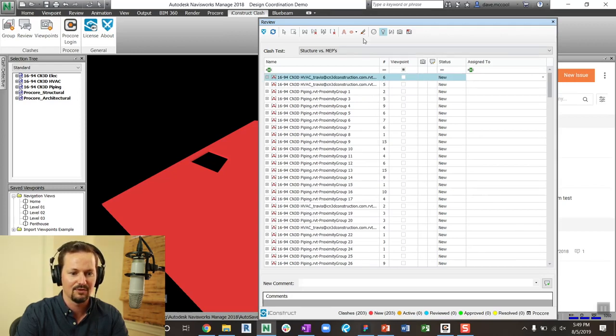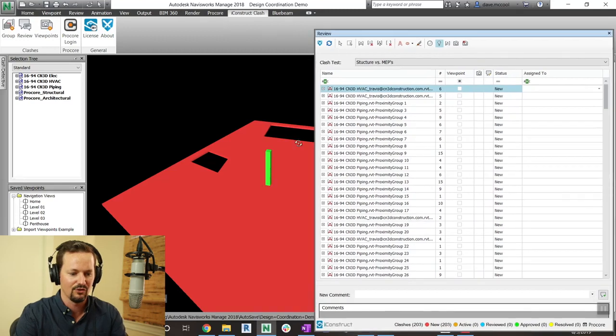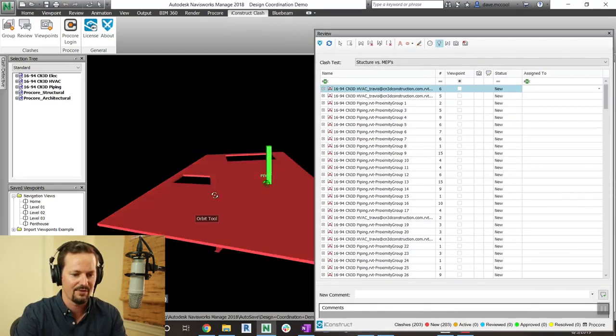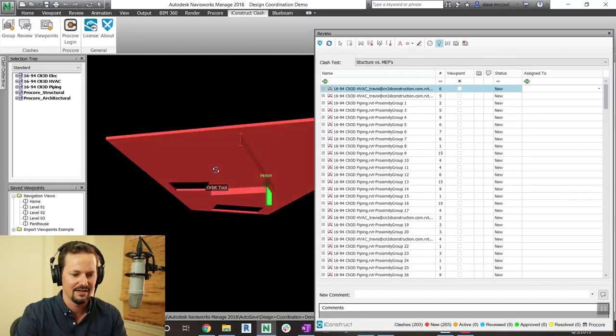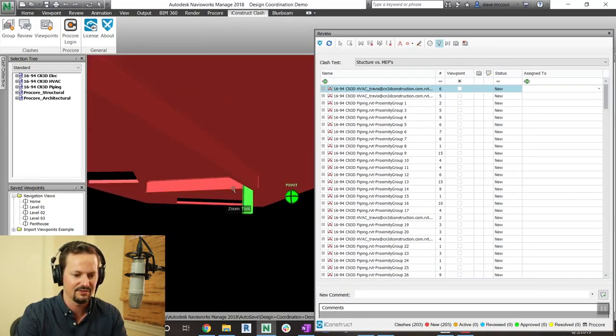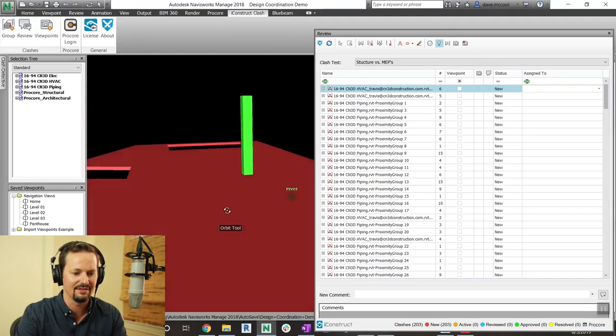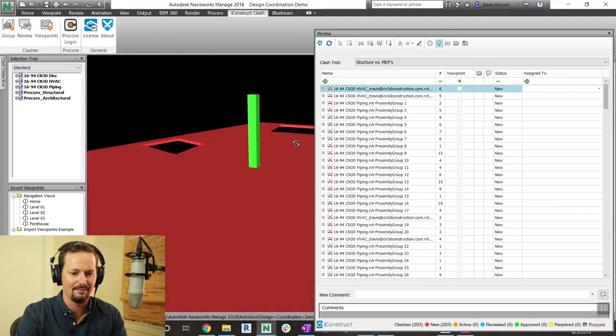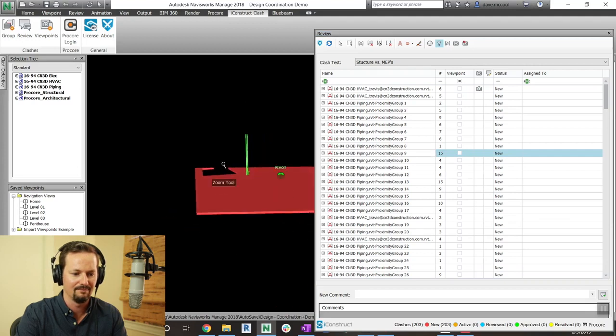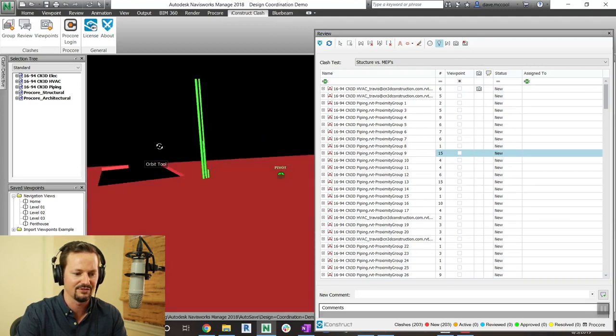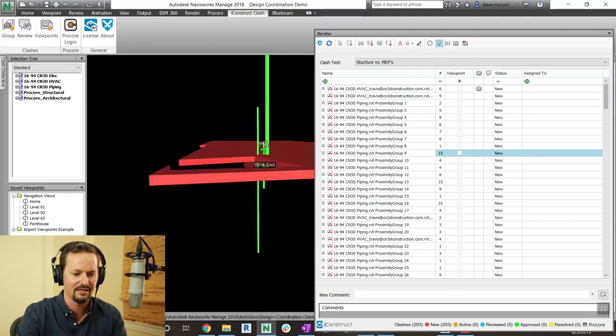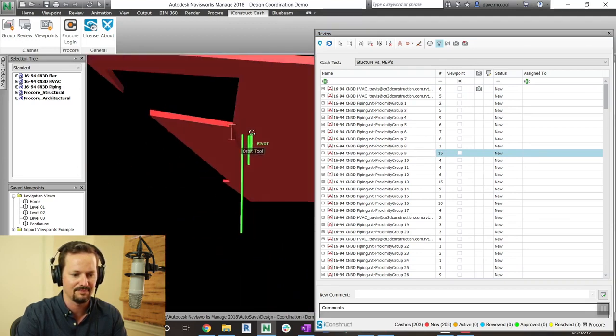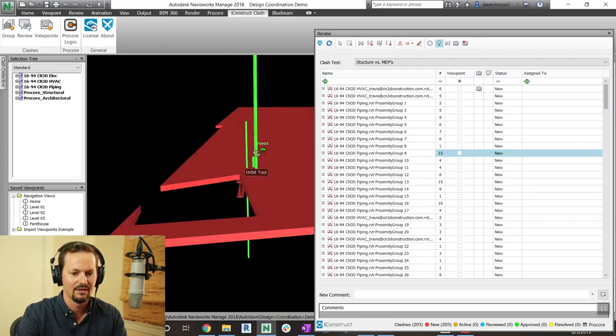So I have six clashes in this group. If we take a look, we can rotate around and you can see it actually has, this looks like a riser with the beam and the slab as the conflict. But you can also see like this one with piping has 15. So it grouped all of these into one clash for me. Looks like it's clipping the beam as well.